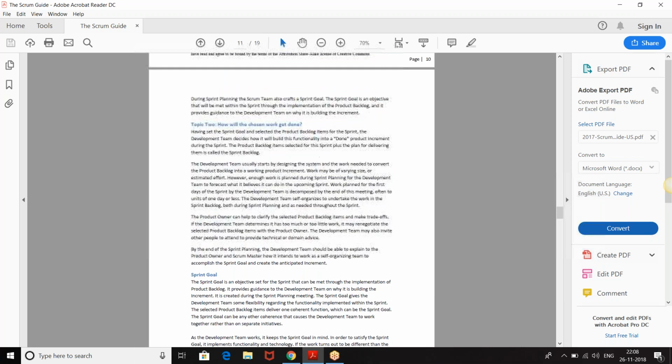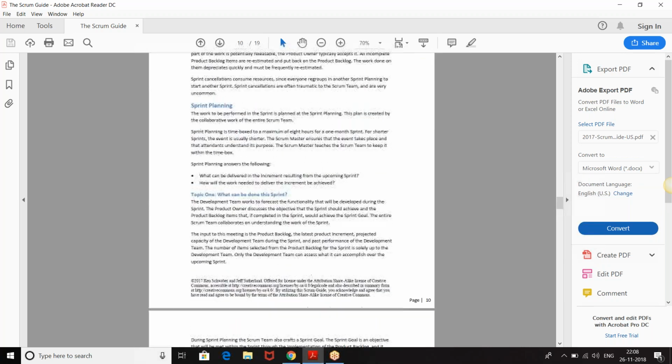But what I can tell you in a nutshell is that when you have a product, the product backlog is ordered in multiple ways. Let's say you want some feature rolled out first, like a login or register feature. We took the Amazon example, where one part of the website is to be released first. Those things will always be on top of the priority when it's ordered. Things they want to experiment with later, an innovative idea, but they don't have the budget or enough people for it, will go down. So a product backlog can have anything and everything.